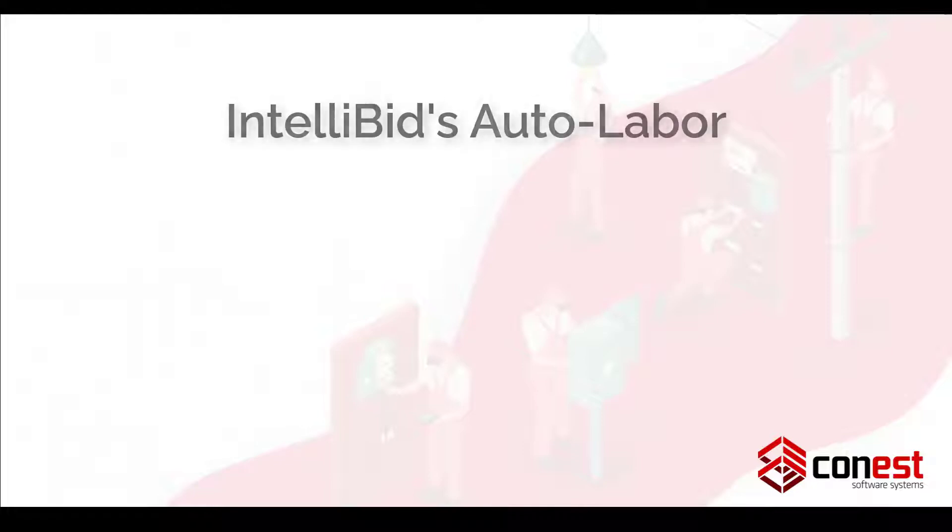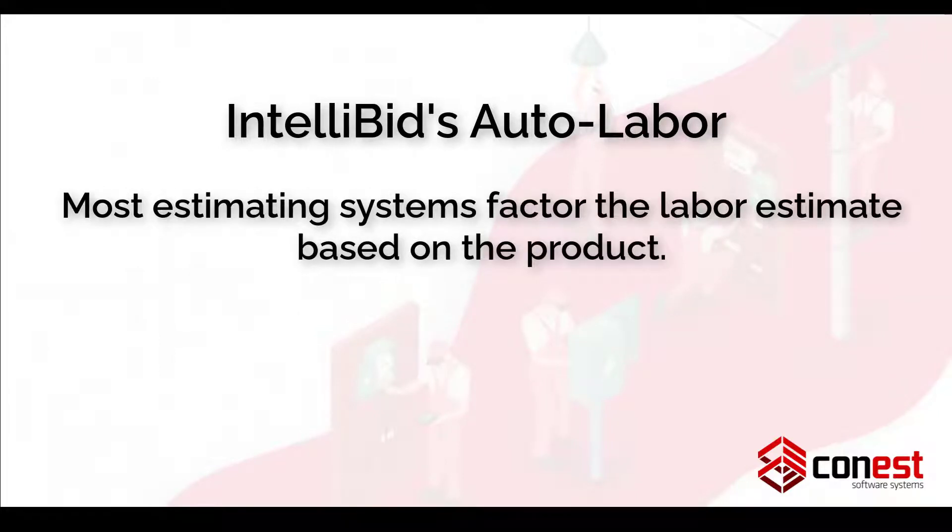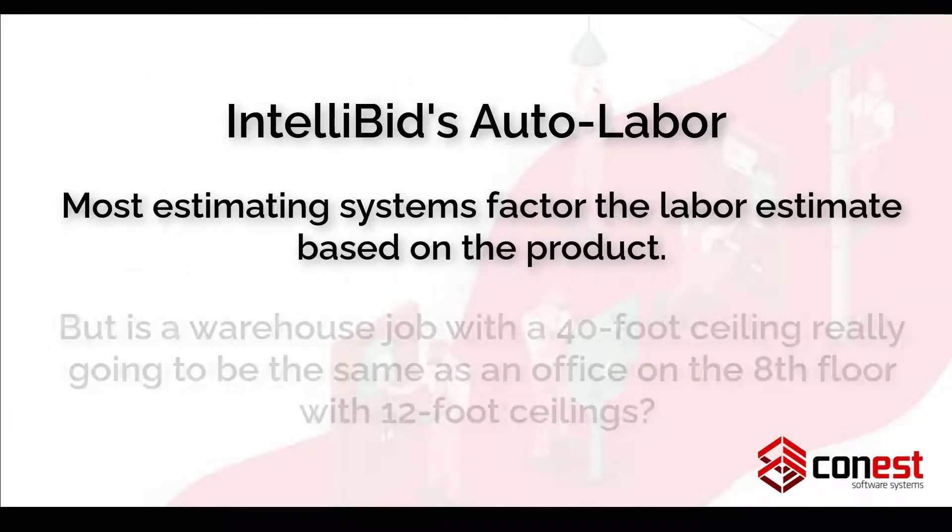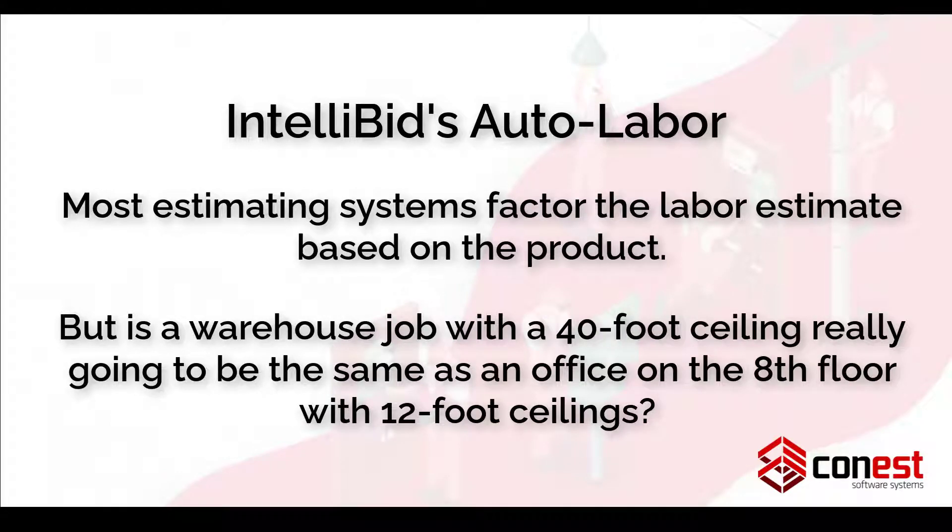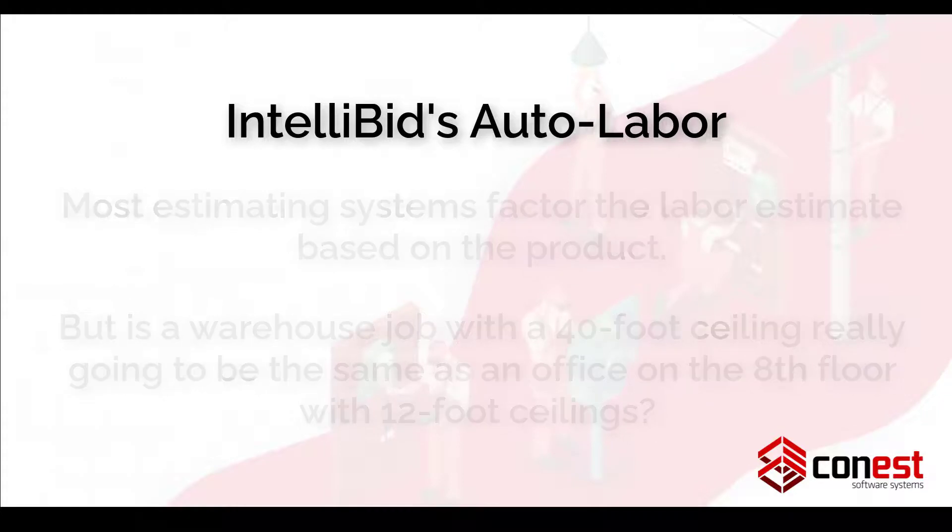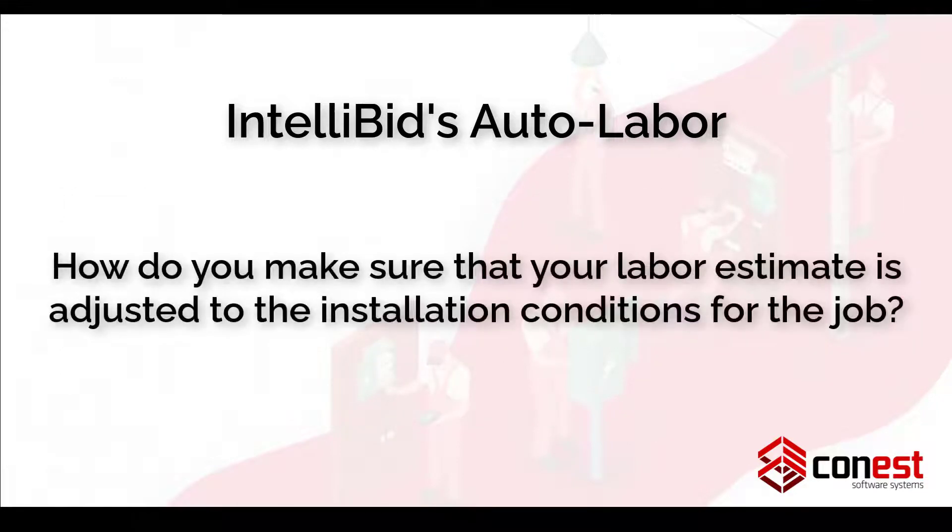And finally, feature number five, IntelliBid's Auto Labor Feature. Most estimating systems factor the labor estimate based on the product, but is a warehouse job with a 40-foot ceiling really going to be the same as an office on the 8th floor with 12-foot ceilings? How do you make sure that your labor estimate is adjusted to the installation conditions for the job?